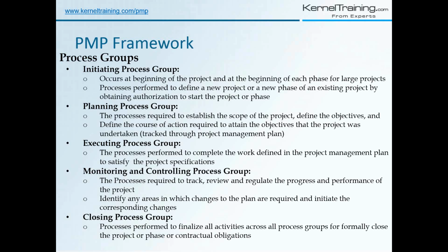And then finally you verify the scope, and then you obtain the final sign off from the customer. And then you archive all the lessons learned, what were the mistakes, all documents are archived, and then finally you release the team. So there is a proper process for closing the project.